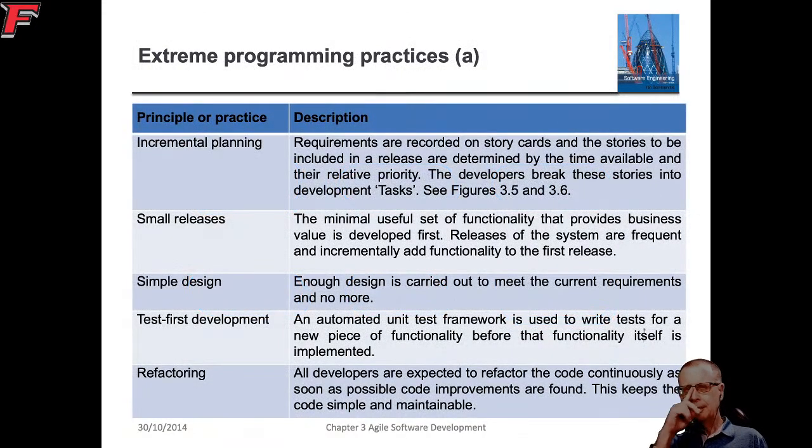There are some specific things that extreme programming says you should do. So incremental planning, don't do it all up front. Small releases, don't expect a big bang at the end. Simple design, only design enough to satisfy the current requirements.